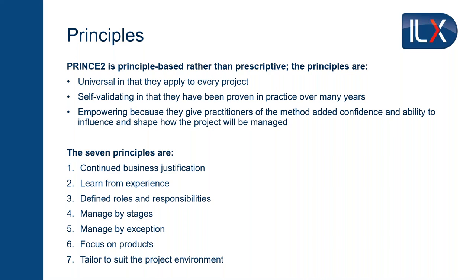Continue business justification: why are you doing this project? What's the value? If there isn't a justification, don't start it. If there is, start it, but keep looking — is it still worthwhile doing? What we're checking is that the benefits of doing this change outweigh the cost and risk. You don't have unlimited resources; if you're spending those resources on something that doesn't add value, it's a waste. It may be that your project starts with 'we think this is a good idea' and part of the project should be to prove that — if it doesn't, close it before you waste more money.